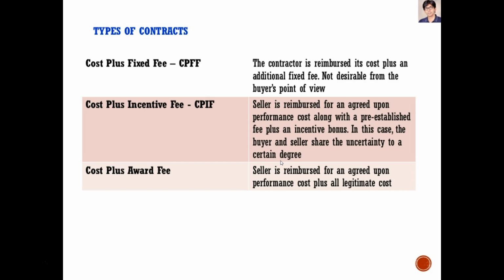By the time we were done, we were well over $1 million for that particular build. And then they backed out and said, you know what, we didn't really think it was going to cost that much. And we actually ended up in court, so it got a little ugly. So it's one of those ideas of make sure you get that all documented. Now, we had memos of understanding from AT&T vice presidents that that's what we were going to do, and yet they still tried to back away.